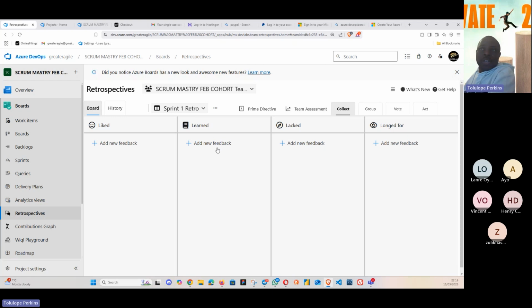So as individuals are doing it, the best practice for me, and I didn't let us do this beforehand because I know we're going to talk about it, is that once we finish the sprint, I'll create this board and I'll let people know that the board is being created. So throughout the sprint, you can come in to give your feedback while we discuss it at our retro, rather than say, "Oh, I give everybody 15 minutes or 5 minutes." That's one delay. It causes delay. Secondly, people may have forgotten what they even want to put.